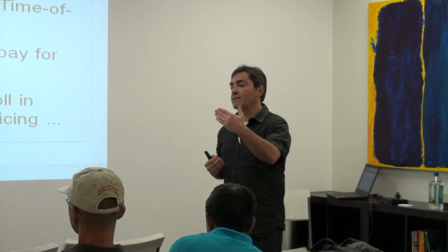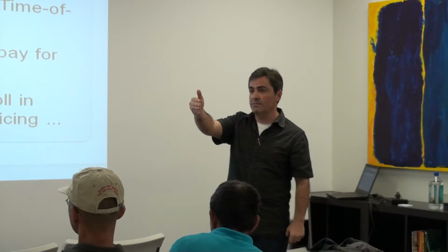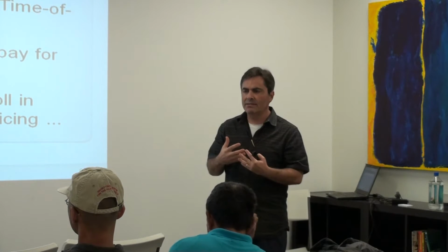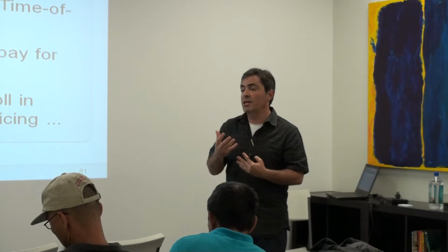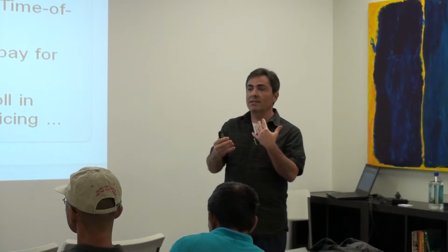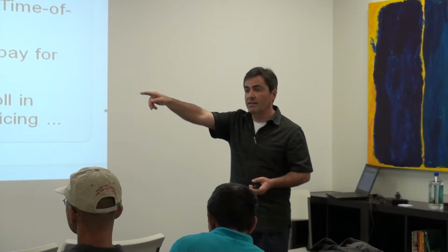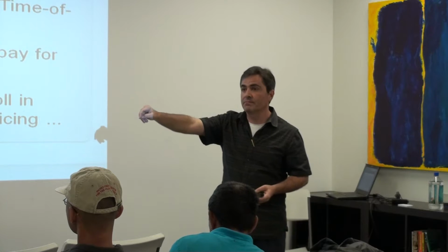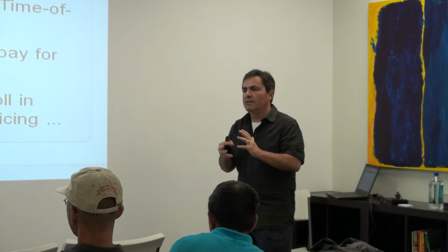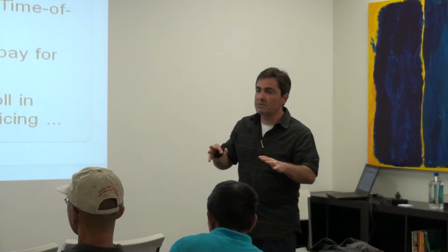And the very first user story that you have is building that interface with a mock object underneath it. So you give that to me on day 2, and I build my UI around that. And if you've done a good job, you also have a way for me to get some exceptions so that I can actually do some testing with my UI and your mock object. And in the following sprint, I'll actually get the implementation of that. So these are ways that you can collaborate with other teams, and you want these techniques so that you can do a lot of parallel development.